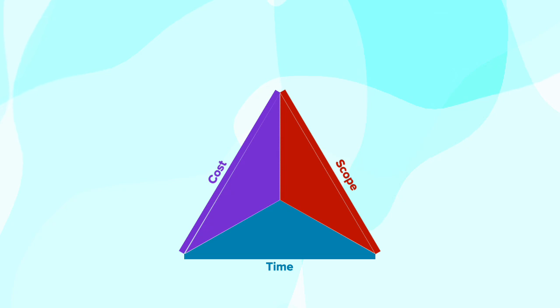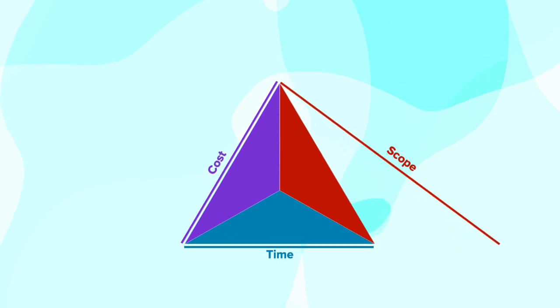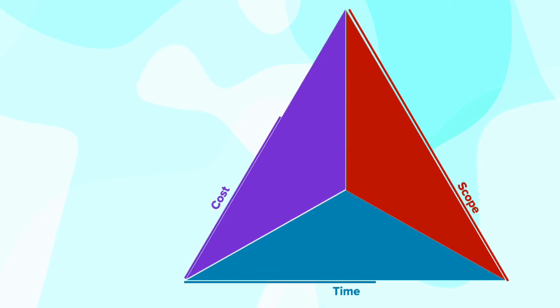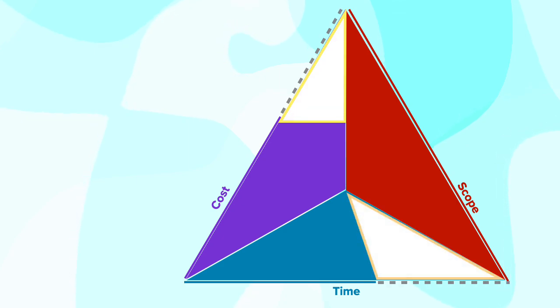So finding that perfect balance between cost, scope, and time can be particularly challenging. And as another example, if it turns out that the scope of a project is going to be more than was originally anticipated, as we start to develop this information system, it turns out there are additional aspects of the problem we identified or the solution that we're developing. So in order to accommodate for scope, there's going to be adjustments in both cost and time in order to appropriately meet that sense of scope.